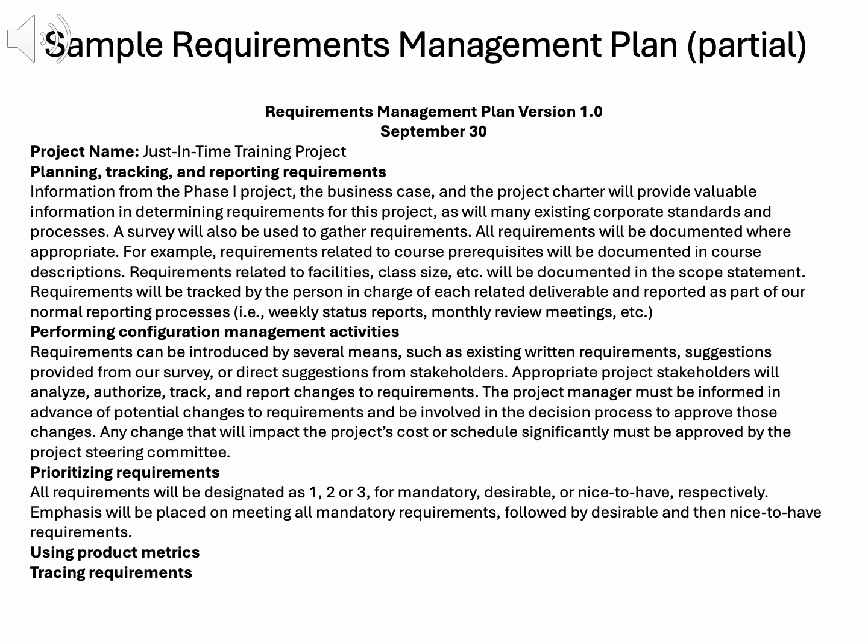Prioritizing requirements is another key feature. Requirements are labeled as mandatory, desirable, or nice to have, focusing efforts on critical needs. For the training course, content is mandatory, while flexible delivery methods are desirable, guiding resource allocation. This prioritization ensures the project delivers maximum value.